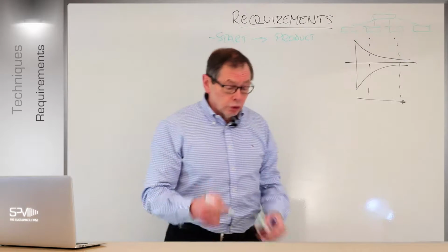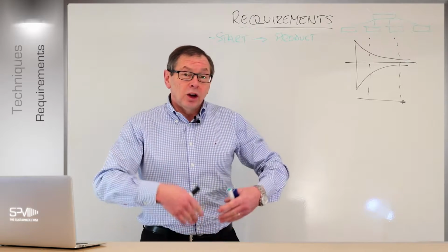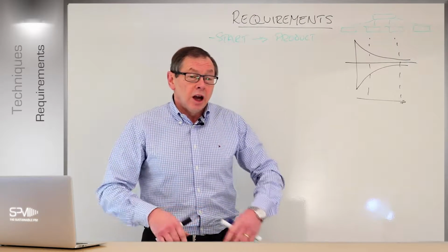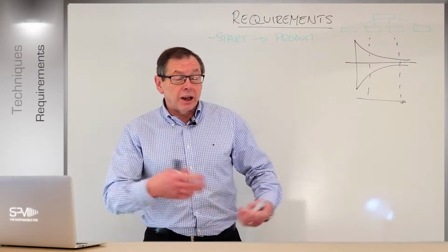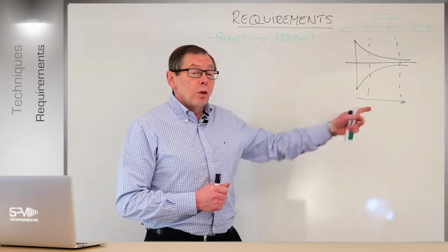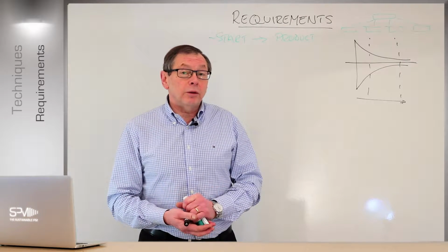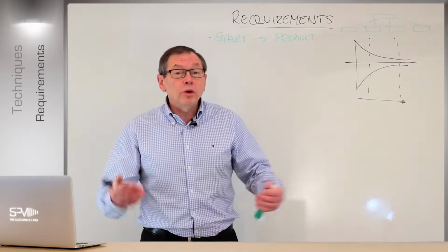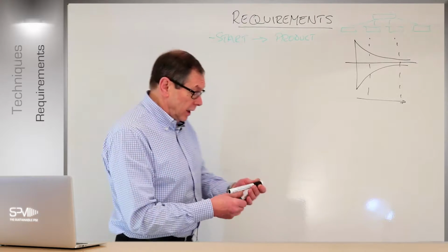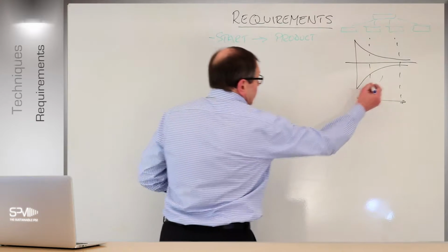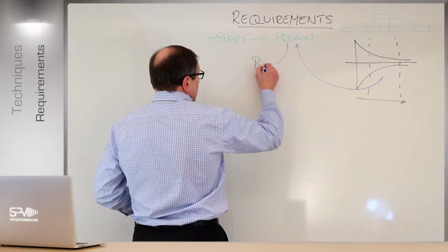When we go into the second phase and put a lot more design behind the project, in other words, start planning, looking at more detail about the scope that we need and all the other mechanisms, how we're going to deliver it, the solution we're going to deliver, and other things, how we're handling risk, etc., management of the project. We look at that. The main thing we're doing here is breaking the products down. We need to break them down first of all. Until I do that, I can't do anything else. And then we can prioritize. And it's at that point, when we get into this second phase, that the product now becomes a requirement.